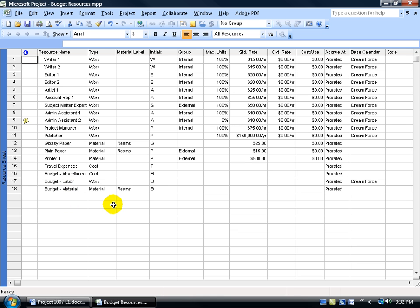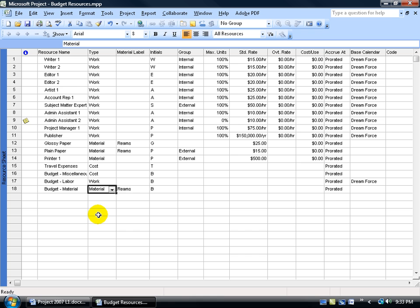The next question is: where do I enter in all my values for my budget resources? The value for cost resources is in currency, for work it's in hours, and for materials it's in units. Remember, this is a resource, and we're going to assign these budget resources — just like all the others — to a task. What task? It's going to be the project summary task, because that's what you're keeping track of: the budget for all materials, work, and cost for the entire project. That's the first step.